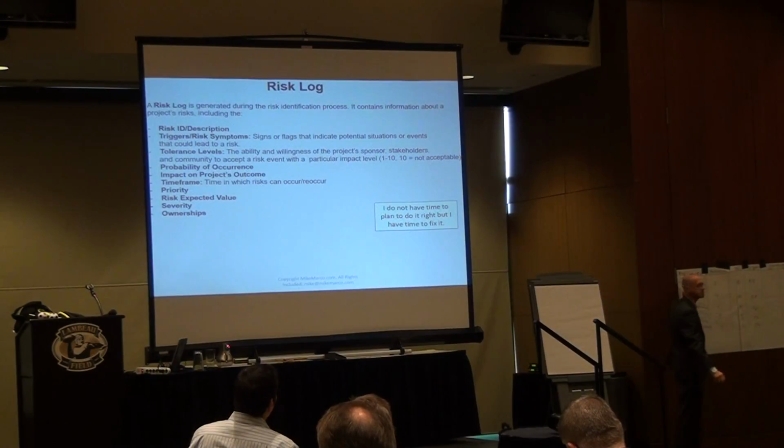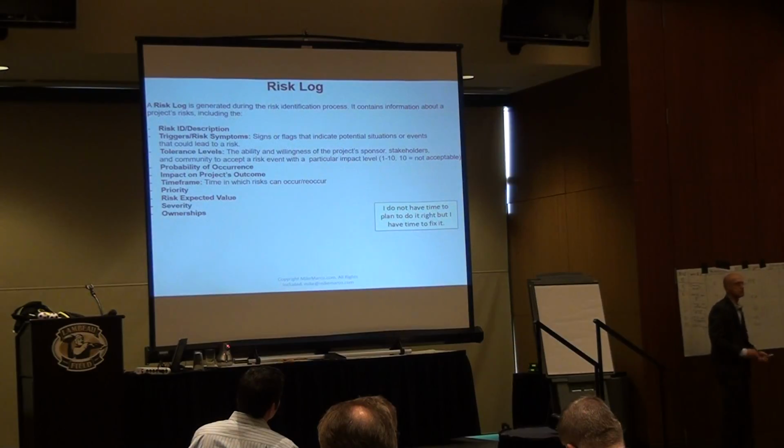Whoever owns this WBS ID, that's the guy who owns this risk. That's the guy who will tell me about this risk. If I don't have this connection, I'm not going to be able to solve it. They have to participate. They have to tell me what is the risk, probability, impact. And I just sum the numbers.